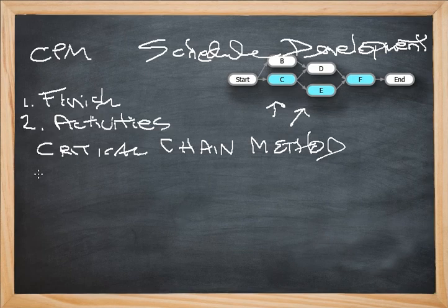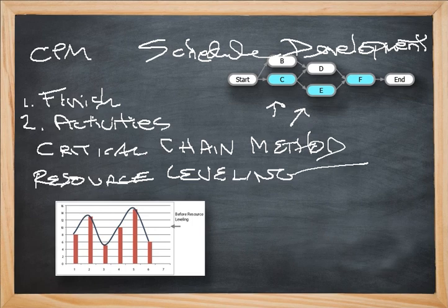Finally, there's something called resource leveling. This is very interesting. Resources may be unrealistically assigned, and it varies by time, as shown here. On the y-axis is the number of resources, and as you can see, even though the network diagram shows the dependency that makes logical sense, the application of resources associated over time to get all that work done may be incredibly varied. Unless you analyze the resources used throughout your project, you may be making a horrible mistake.